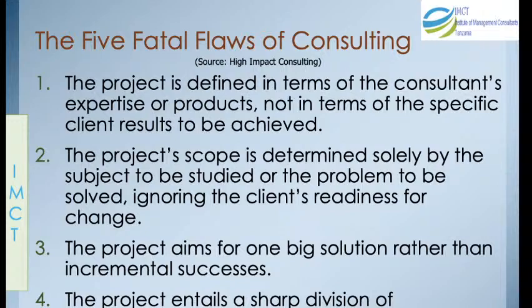Number 2, project scope is solely determined by the subject to be studied or problem to be solved, ignoring the client's readiness to change. Change management should be part of the implementation criteria. Number 3, the project aims for one big solution rather than incremental success. There is no one big answer to every question. No. There are so many other factors to be considered.